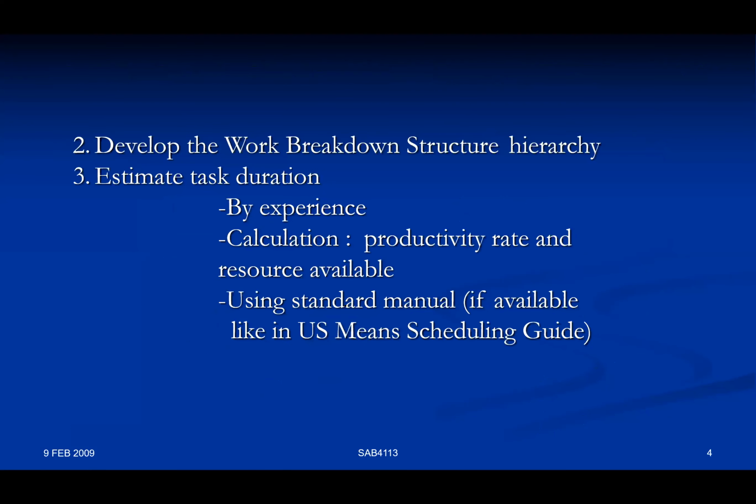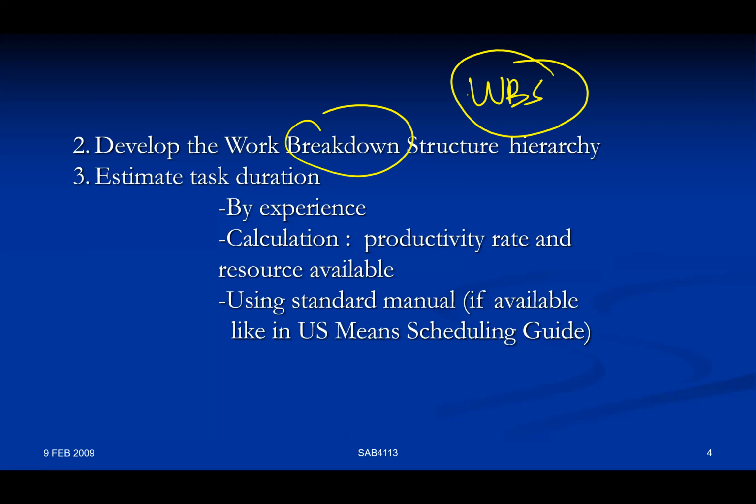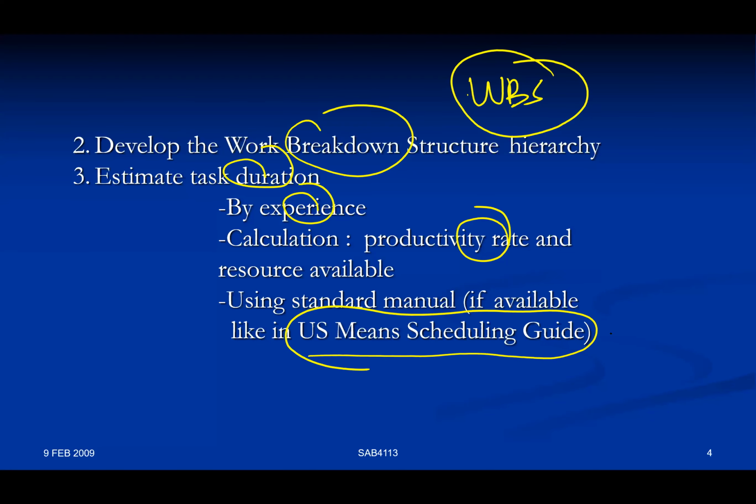And then what else? Develop WBS. WBS is the one that we are already talking about, because it is very important. This is where our activities are generated. And then estimate task duration, using experience and productivity rate, or the US RSMeans scheduling guide. This is for US reference. If you refer to it, it might not be usable in our country or in any other country, because the way they do the construction might be different.